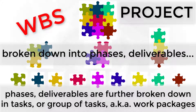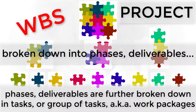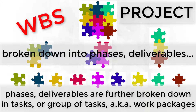Usually, projects can be divided into phases, deliverables, or subject matter. For instance, an IT project is divided into phases such as planning, requirements, system design, development, testing, and implementation. A wedding event project can be divided per subject matter — for instance, invitations, ceremony, venue, gathering, bridal, etc.